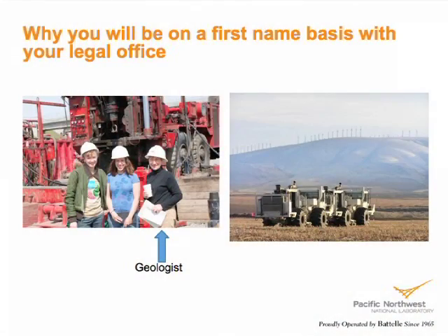What she won't tell you are some of the details which you, as the project manager, are going to have to get into. To do this seismic survey, you're going to have to run these lines over about 4, 5, 6, maybe 10 miles. And these are trucks, as you can see here, that are slamming a hydraulic ram into the ground to put an acoustic wave into the surface, and somebody puts out geophones to listen to those reflected acoustic waves.